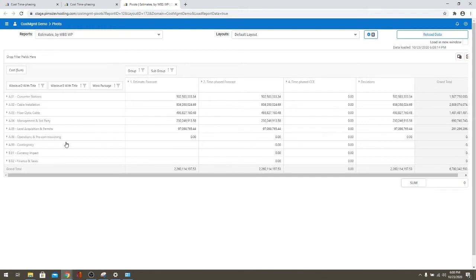What we're still missing is the contingency levels, and typically that involves another process on the project when establishing a baseline. In order to establish your contingency levels, you can either just populate your estimate into contingency packages, or you can use our contingency management tool to populate the estimate based on the percentage of the remaining estimate or based on the risks assigned.